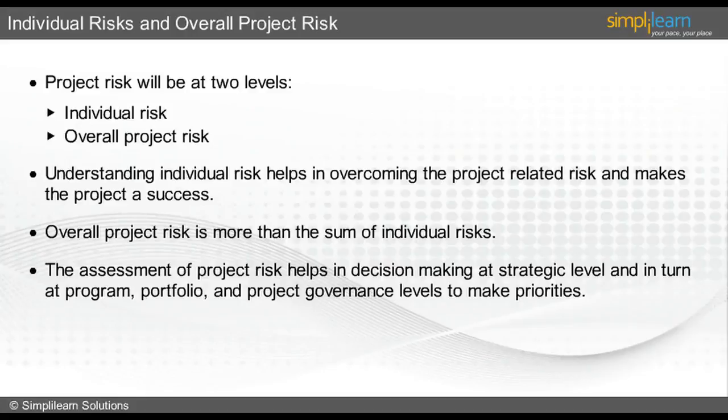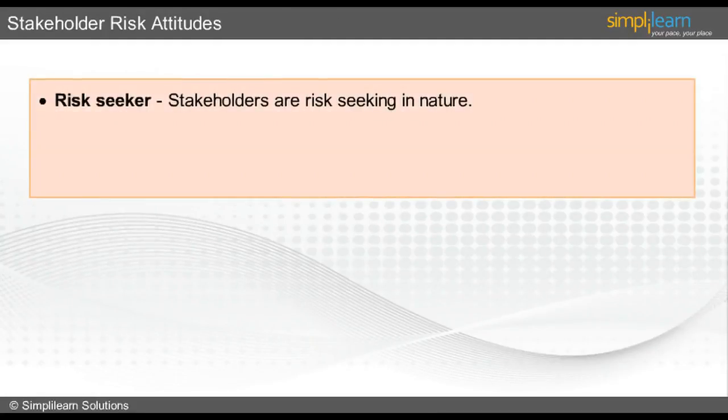It is important for a project or a risk manager to understand stakeholders' risk attitudes. The risk attitudes of the project stakeholders determine the extent to which an individual risk or overall project risk matters. Some of the factors that influence risk attitude are stakeholders' sensitivity to issues such as environmental impacts, industrial relations, and strength of public commitments made about the project performance. Risk attitudes usually result in a desire for increased certainty in project outcomes, and it may express a preference for one project objective over the other.